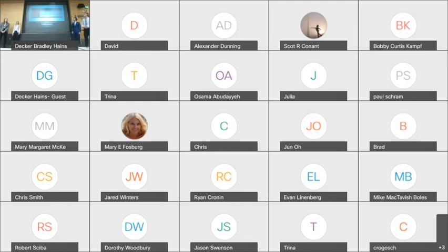The scores for the cost per parcel were based off those numbers you saw in the last slide. Constructability was based off the theoretical ease of construction for both layouts, with the major factor being the mile-long construction required for the public layout on the right highway. For potential for expansion, that was based on 2 different factors. One previously discussed, for the public layout, it allows for 2 access points to the 100-acre lot, where the land will make a lot 1.